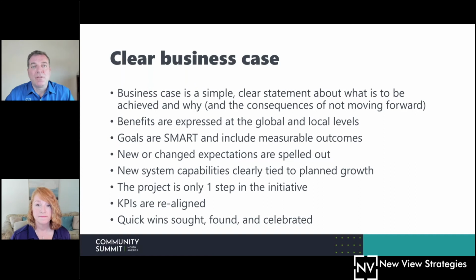But guess what? That really centered the team to understand, okay, how are we going to take advantage of the software to accomplish those things? How are we going to improve our processes, right? And it gave them those measurable outcomes to really judge. And people felt like it was a win because they were able to do that. It's beautiful. You'll see a lot of project plans where they call it the success criteria. The success criteria is that we close our books in 15 days because it's been taking us 30 days.